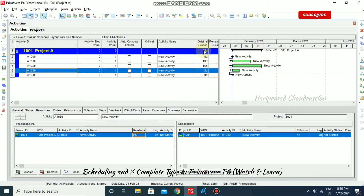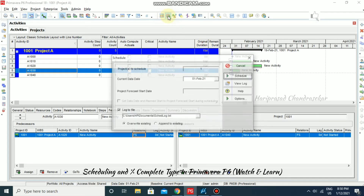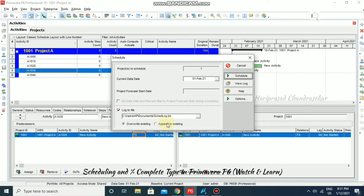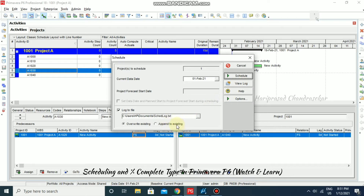We have 15 days original duration but now we're going to schedule it and see how the duration changes. Click Schedule, change the date if needed, and you can go for log to file to view the log later. Overwrite existing will create a new log; append to existing adds to previous logs. Overwrite is the default.